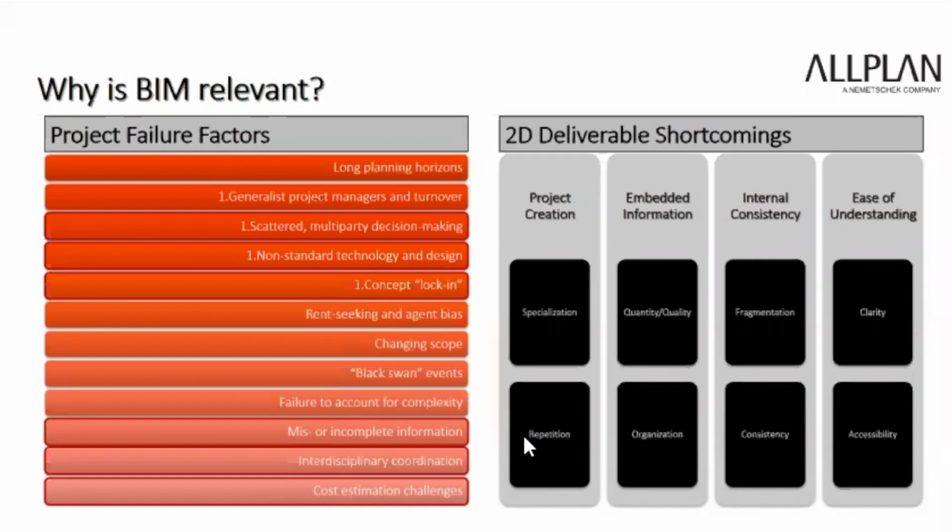Another example would simply be that the quantity and quality of the information that we get really does limit our ability to estimate costs accurately early on. We come into problems like the California high-speed rail project, where no one really had a good understanding of what it was going to cost. And because of that, it was very nearly impossible to plan for it.